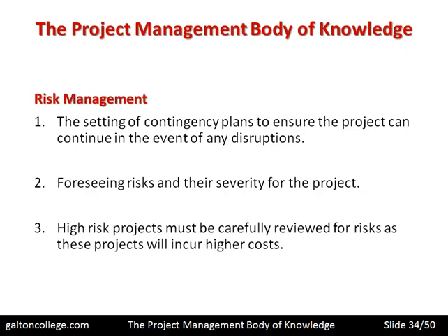High-risk projects must be carefully reviewed for risks, as these projects will incur higher costs. So it depends on the nature of the project, but some projects may have high risks built in, and therefore more contingency planning will be required, and this in turn will mean more detailed planning, more resources, perhaps a bigger budget. So the project itself will be more expensive because there are higher risks anticipated.